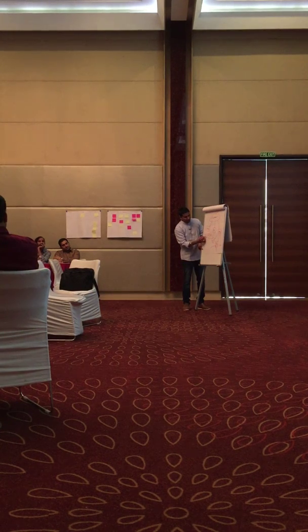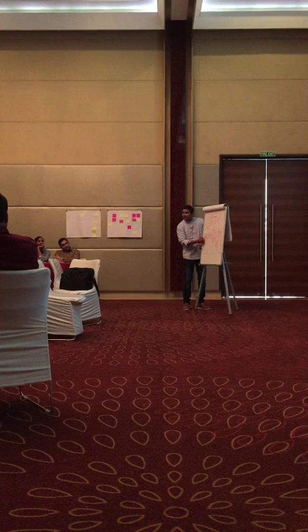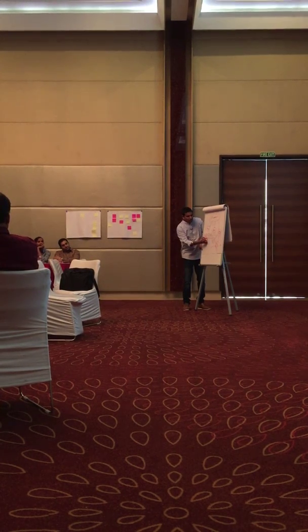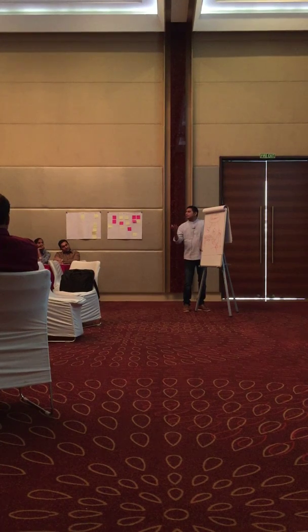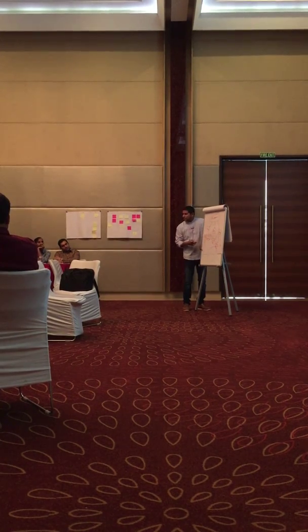Now you took 5 items to a particular sprint. Out of these 5, one is not done. What happens? It may either go back to the backlog if its priority is not really important, or it might move to the next sprint backlog. That means the sprint number will be changed to the next sprint, which is really important. Who decides on that? Product owner.